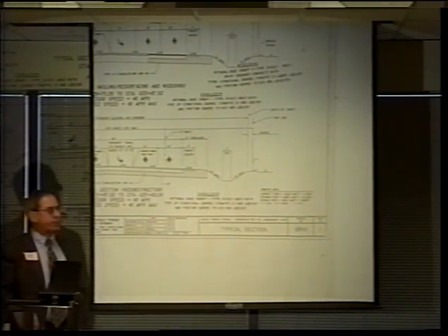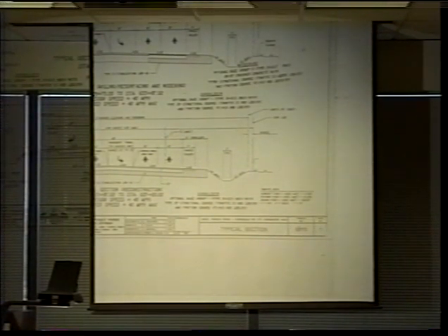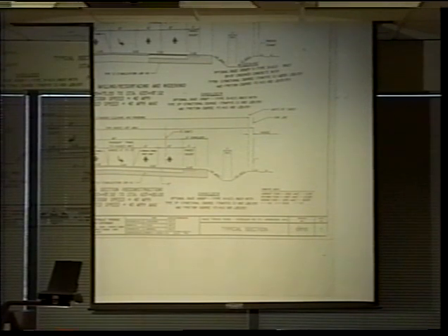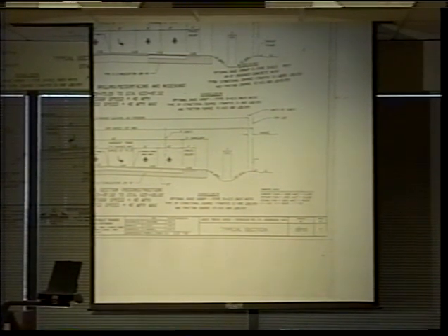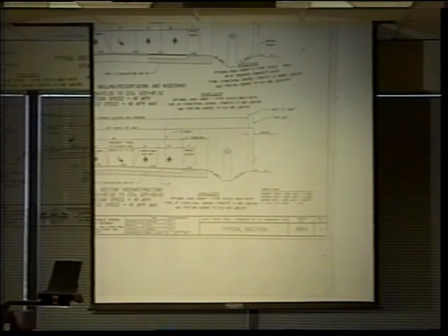And in 2002, the average annual daily traffic was 17,200 vehicles. That's 17,200 vehicles per day. That's a two-way count. This project, because of funding and where it sits in the county's capital improvement program, is scheduled to be opened in the year 2005. The transportation models predict the ADT to be about 25,200.